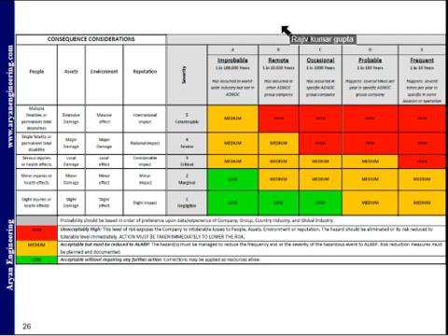So that is the probability. Now the next term is the impact. A risk by its very nature always has a negative impact. However, the size of the impact varies in terms of cost, impact on health, human life, and some other critical factors. The chart allows you to rate potential risk on these two dimensions. The probability that a risk will occur is represented on one axis of the chart. So there is a probability and these are the impacts.